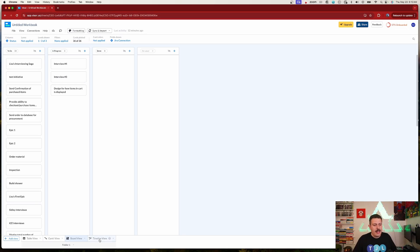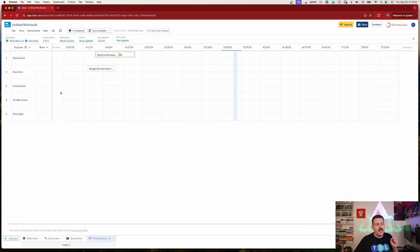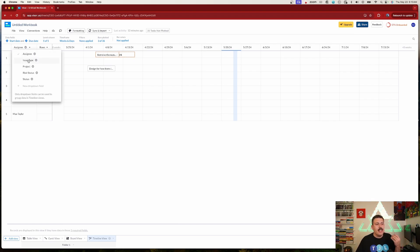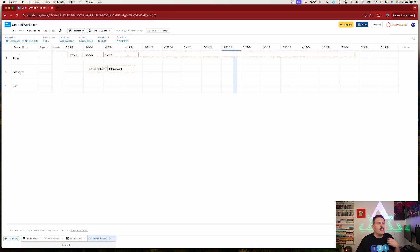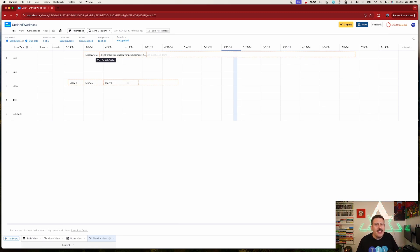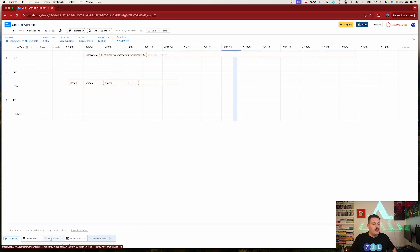Finally, the timeline view — accept the defaults or configure as you like. This shows a capacity plan: all the different assignees and the work assigned to them. You can see Alana has a couple of stacked items. You can also change the grouping to show issue types, projects, risk status, or statuses. If all your work is clustered with similar dates, your team is probably stretched too thin — this view helps you see that.